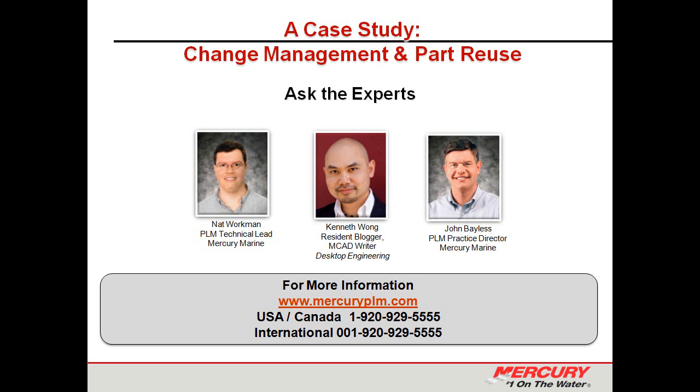But if you initiate it too late, you may lose track of the cost or some of the cross-functional implications of a change. In other words, there won't be the communication, which is really what the change board is all about. Yeah, and in our case, the product validation phase of a new product program is where we start transitioning from that Class A blanket change for a new product program to the more traditional Class B change for a part for an existing product. Because during the production validation phase, we're trying to exercise the production systems at that point.